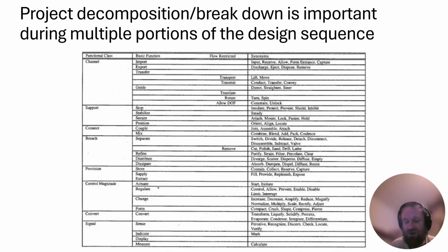We could look at what is currently out there in terms of the baseline and break down those functional components in order to determine where we might want to potentially intervene with regards to the system that is the product. At the same time, when we're breaking down these different functions, different team members could take responsibility for each of these sub-functions or subcategories of the project and find ownership in that manner.